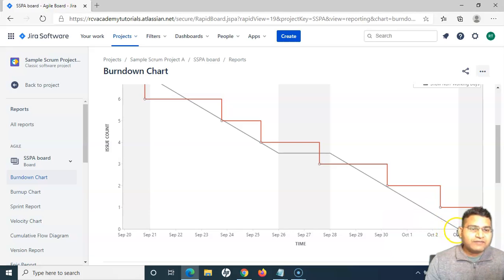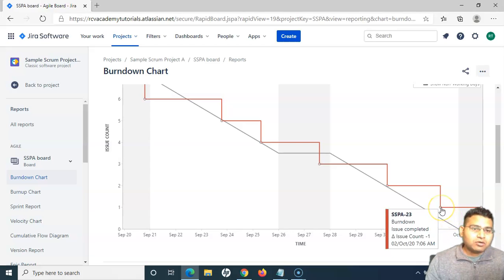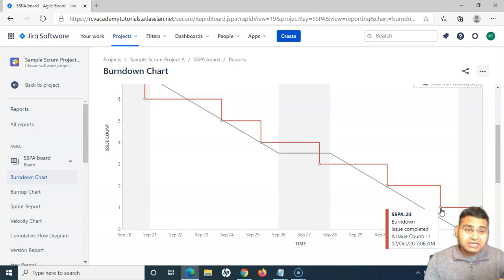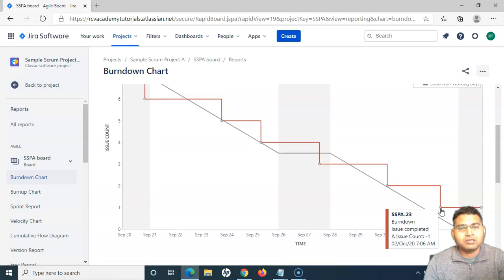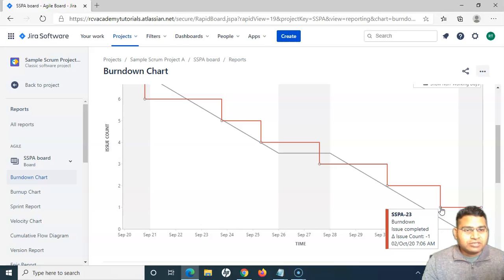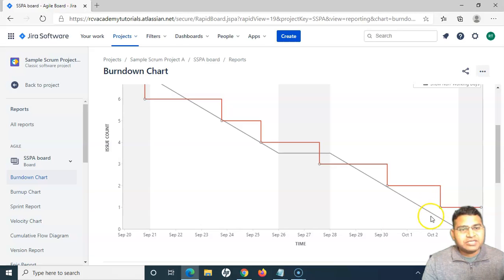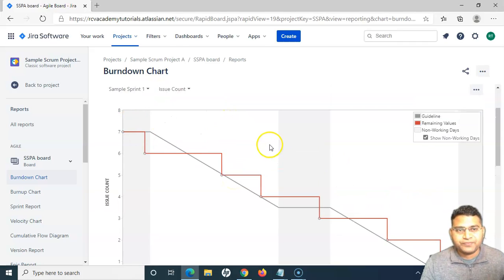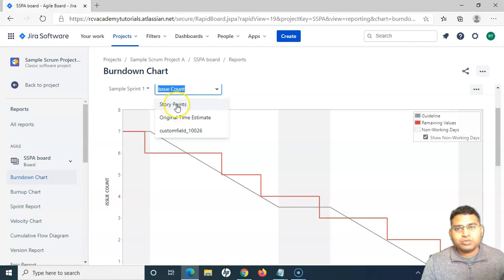For example, the sprint closes on October 3rd and on October 2nd there is still one issue remaining. You can analyze that issue and assess whether it can be completed within that last day. You can also check whether there is any bottleneck or blocker — if it is removed, the issue can be closed. This information is easily identified from the burndown chart, helping you keep track of the overall sprint. This was based on issue count; similarly you can use story points or time estimate.